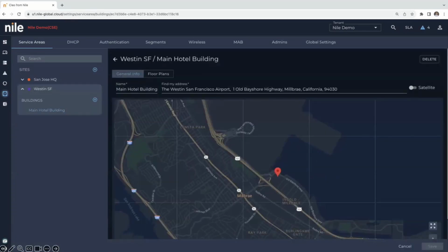This is going to get sent back to somebody on our side, a project manager. We call them service delivery managers, that are going to coordinate all of the resources between customers' resources that might be involved from their IT team as part of the migration strategy, facilities access, those types of things. Coordinate resources with our partners as it relates to who's going to do the survey, who's going to do the cabling, who's going to do the installation rack and stack, as well as coordination with our own resources.